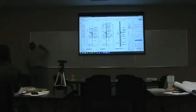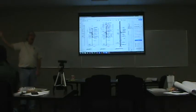Once this roof is complete, not only are you going to be working on the outside of the building doing the sheathing, you're going to come over here and you're going to have interior work, right? What is that interior work? What's the first thing you do? You got to do overhead rough, right? You have duct work, refrigeration, conduit, whatever is overhead, you're going to do that first. Okay. Your slab's in place, and then you have to put in your partition walls. Those walls have got to be roughed. Sheetrock's got to be hung, it's got to be finished. What keys that activity? Roof complete, slab complete in a given area.